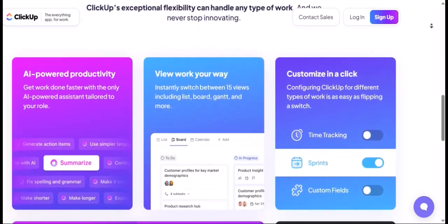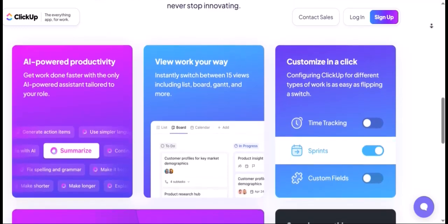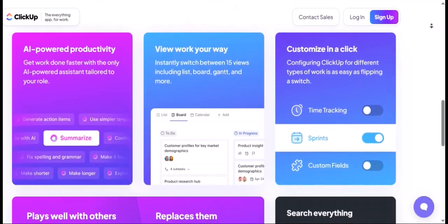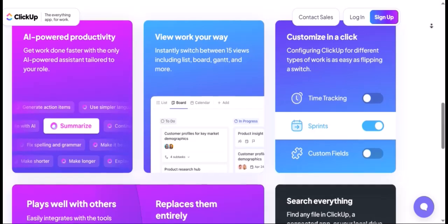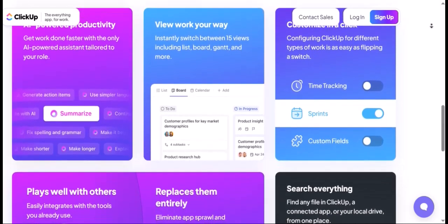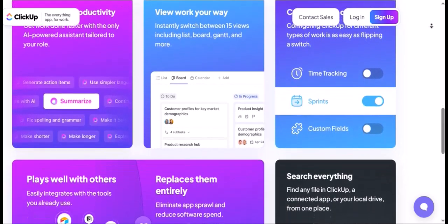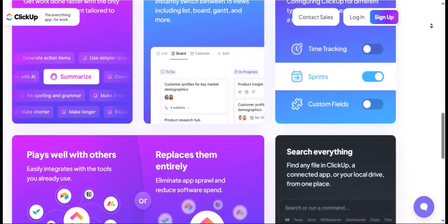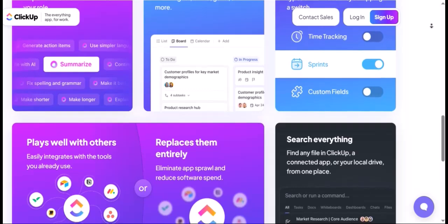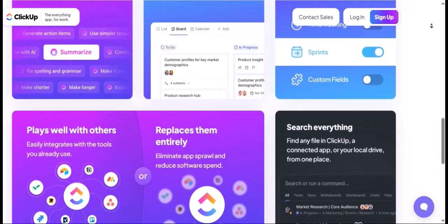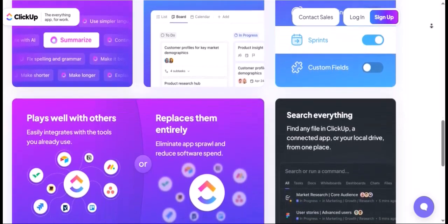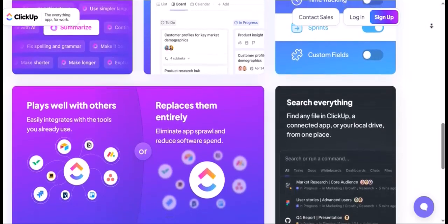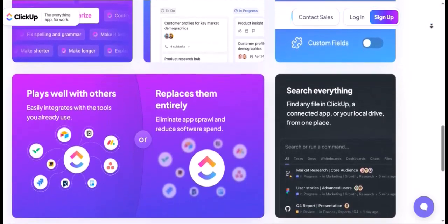Critical path, highlighted tasks. The critical path is the sequence of tasks that determines the shortest possible duration for the entire project. If any task on the critical path is delayed, the entire project will be delayed. ClickUp's Gantt view can highlight this critical path, making it immediately clear to a finance manager where delays will have the most significant financial impact. This helps in prioritizing resources and attention,